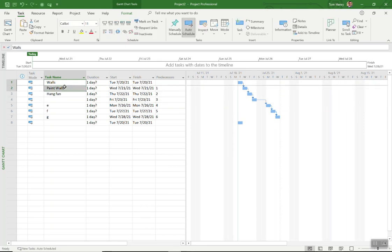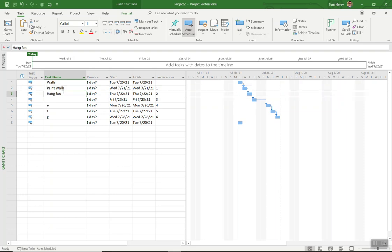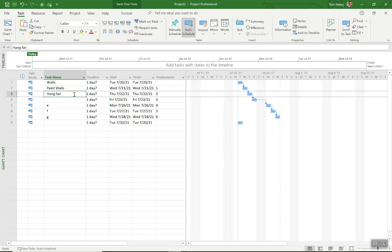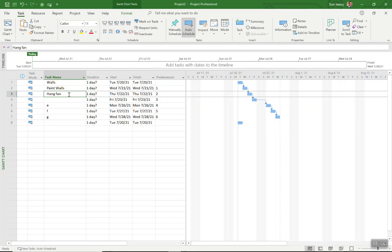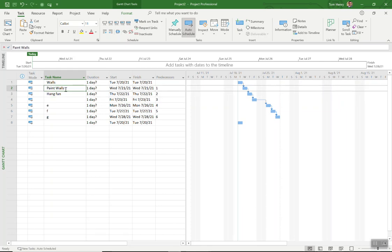If you've got like, let's say I'm building a house right. So put walls up, I need to paint walls, and I also need to hang ceiling fan. I don't necessarily have to have the walls or the walls painted before I hang the ceiling fan. It actually just needs to be dependent upon there being a ceiling in place right and maybe that ceiling had been painted. Do not link this to this because that's the way in the order that you want to do it. Do it to where it truly depends on the ceiling has been erected or the foundations up whatever it is. Make sure that's in place because when you're planning out your project things can go wrong as they inevitably do and you want to be able to push your schedule around and see what happens. Only link a task where a true dependency exists.